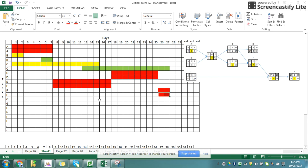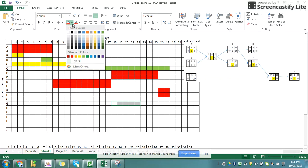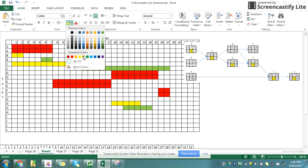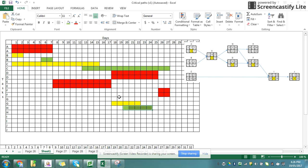Task G starts at 17 and finishes at 22. So G starts at 17 and finishes at 22. You have to be really careful not to overshoot the mark. And therefore, the longer version, the late times, starts at 19 and finishes at 24.